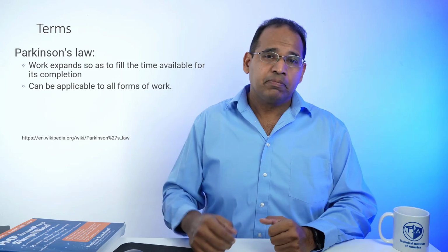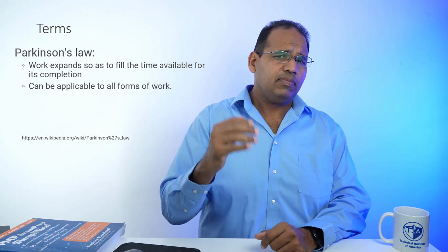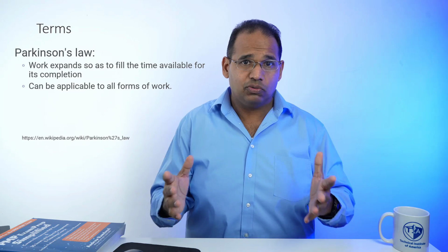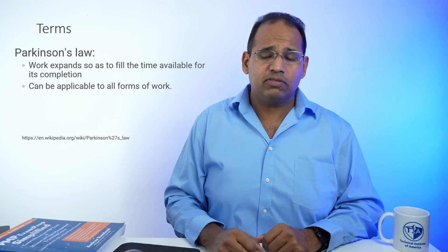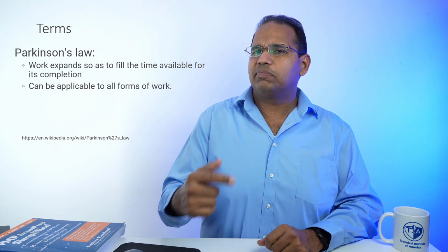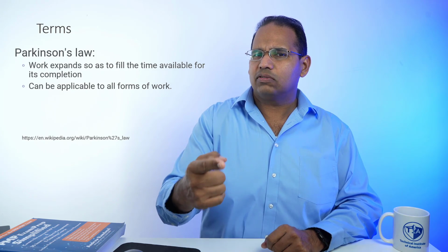So what do I mean by this? Let's say you're working for me and your name is Bob. I say, hey Bob, I want you to do this task for me. You have 8 hours to get it done. It's 9 o'clock in the morning. I want it done by 5. Bob spends all day doing the task. He comes back to me and says, hey Andrew, it's done, 5 o'clock. Now, if I had given Bob 2 hours, he'd have probably got it done in 2 hours.